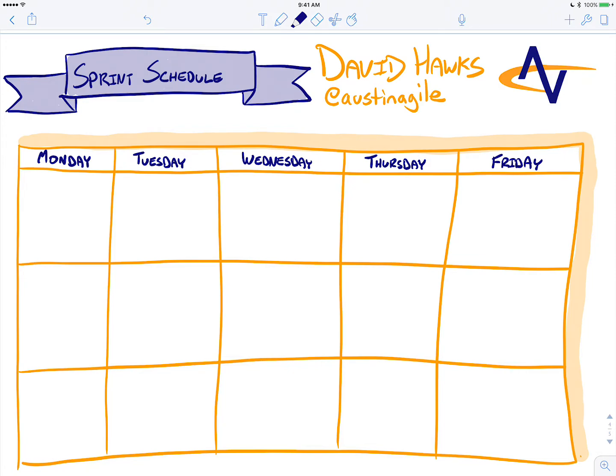So what we have here is a normal calendar, Monday through Friday. Hopefully your teams aren't working Saturday and Sunday. And what we recommend is that you do 14 calendar day sprints, not 10 business day sprints.